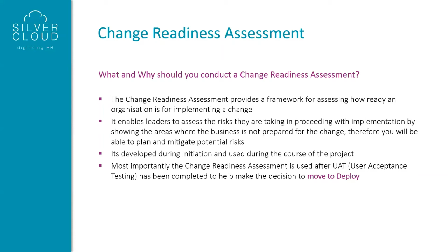It develops during initiation and is used during the course of the project, and most importantly, the change readiness assessment is used after user acceptance testing has been completed to help make a decision on whether we should move on to deploy and go live.